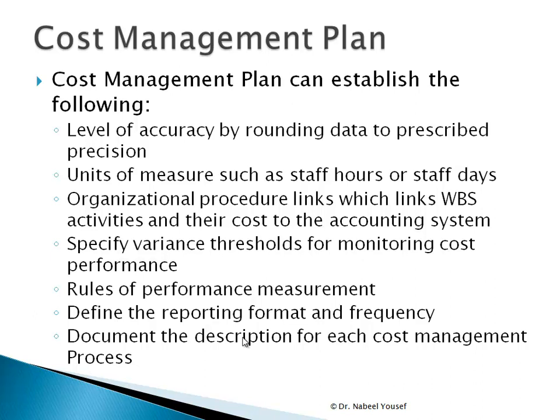Then we need to specify a variance threshold for monitoring cost performance. It should be within a certain range; beyond that is not acceptable. That will be the threshold, and based on that, I will trigger an alert or alarm to act upon the changes or the problem that happens if that variance is exceeded.